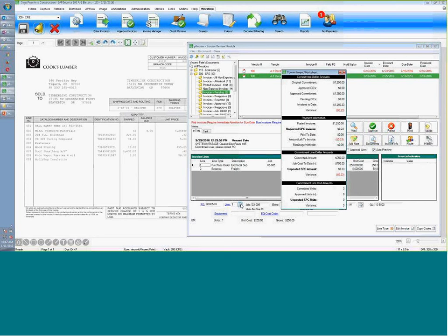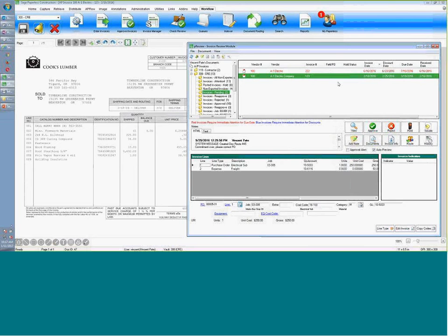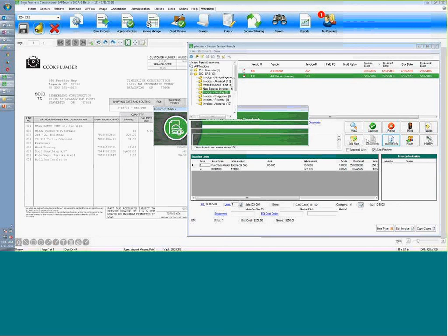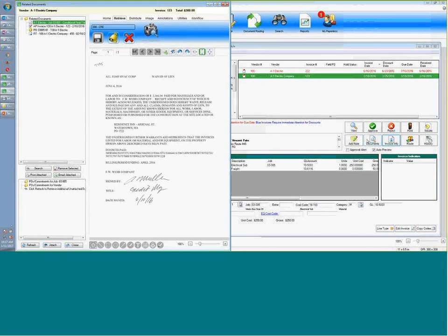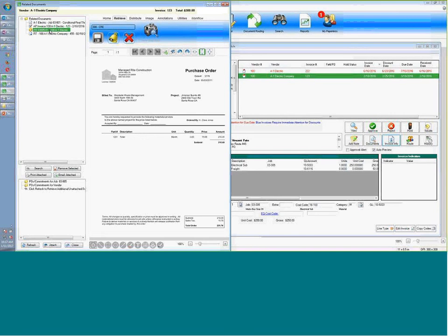I want to make sure my people approving documents can see everything so we don't have to worry about them approving things that were inappropriate or skipping things or just not having the information and not doing the work. Everything's here at their fingertips, tied back into your Sage Accounting. And it connects back in with, of course, Paperless itself so that you can see all those related documents that we had coded in earlier. So if I'm looking at my AP invoice that's from a purchase order, I might want to verify that I have a lien waiver or receiving ticket. I want to make sure the purchase order actually matches the invoice. It's all in here and automatically collates based on all the different criteria we've been using.